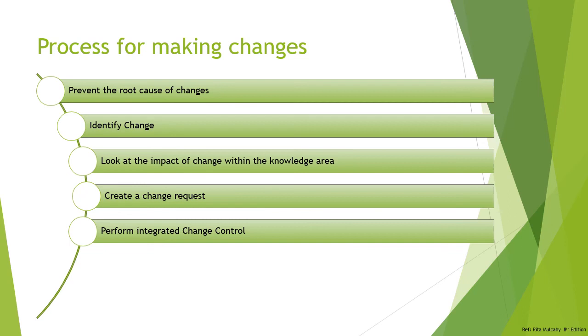So you also need to make sure that changes are either approved or rejected. Anyway, all the changes need to be logged in the change log sheet, but all the change requests should either be accepted or rejected. Project manager may approve changes, but if there is any change that is impacting the baselines or the project management plan, it should go properly through the change control board.